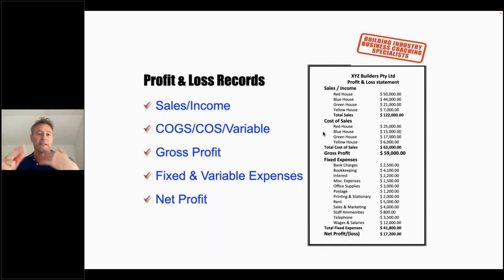So you sign the contract, and then there's your bricks, timber, steel, your subbies, and this is really important. I had a conversation with one of my builders this morning about this. There's your time for supervision and project management. There's your carpenters, there's your apprentices, there's your labor. That is cost of sale, all right? I often see those wages down here where they should be up in cost of sale, and then you get your gross profit. Like I said, 20% gross profit margin is the minimum where you should be playing.